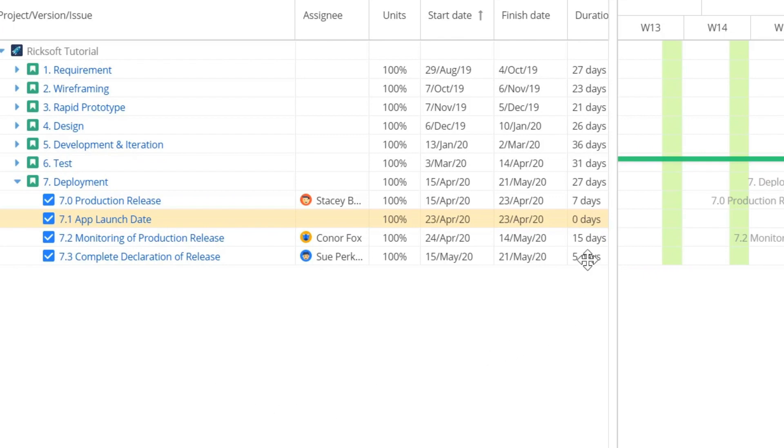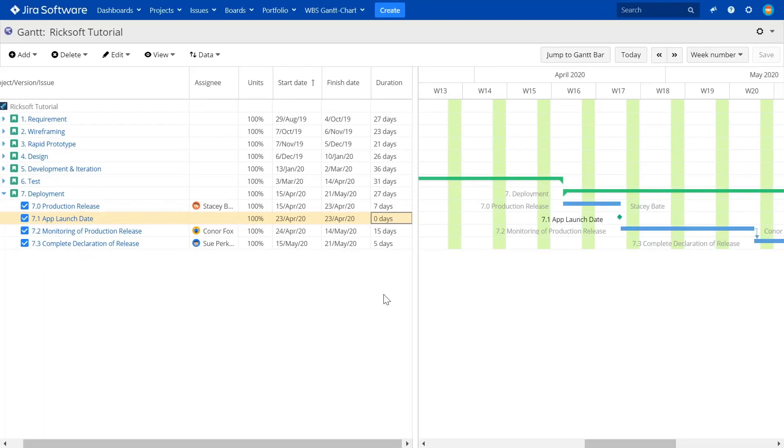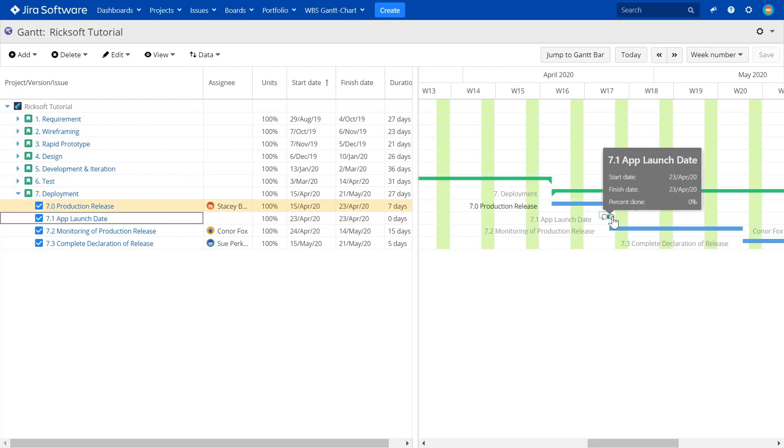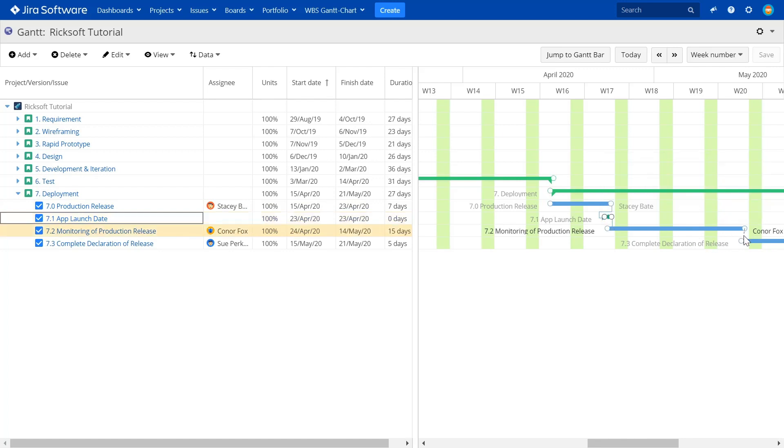Remember, there is no duration for the milestone, only deadlines. Most importantly, don't forget to link the issues and milestones together. This ensures that your team can move on to the next phase of the project once they've checked off the first milestone.